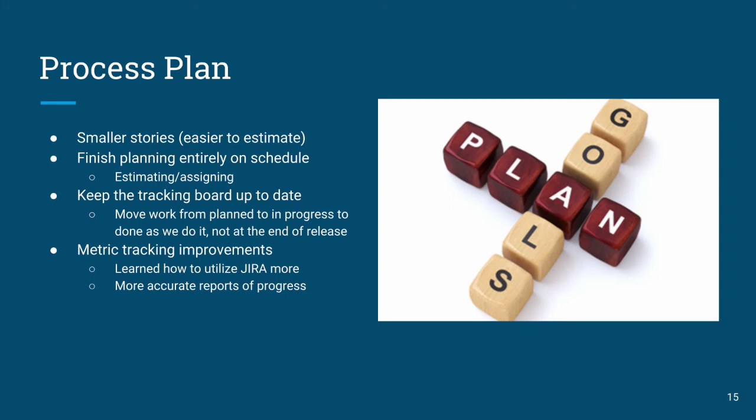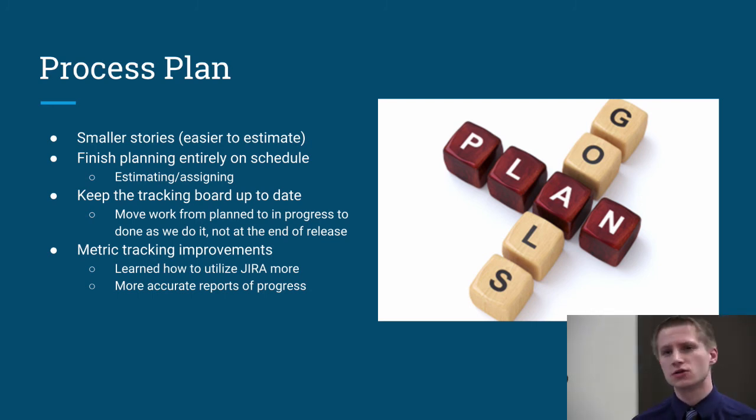So the process plan going forward: we did have a lot of really small stories. So we made sure, like we said, using Jira, we did use story points, using that Fibonacci kind of style. We did use small points, so usually stories were like 1, maybe 3, at most 5 story points to keep everything isolated so individuals could take those tasks. And if they ended up being too big, we would just split them apart because that's the correct way to do that.